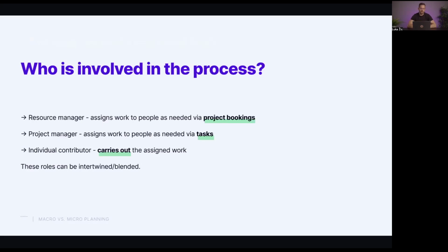There is a caveat with this, and that is that when agencies reach a certain size, and we see it generally being around the 30-ish people mark, you can run into certain issues with not having a dedicated resource manager. This would be specifically when you have project managers who, first of all, let's say, fight over resources, right?